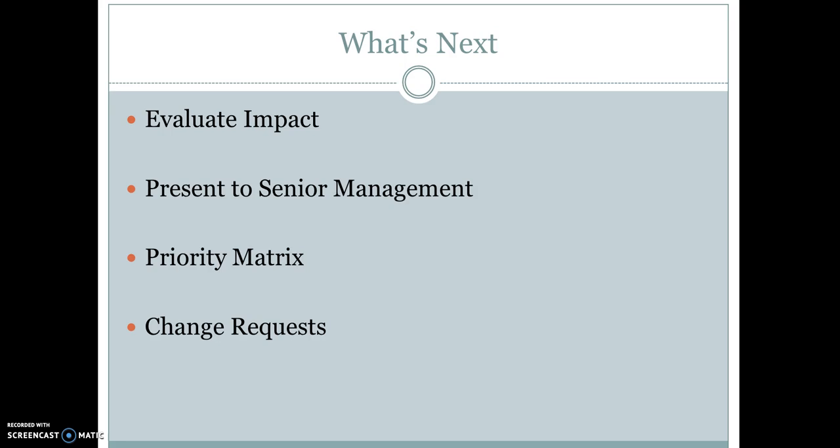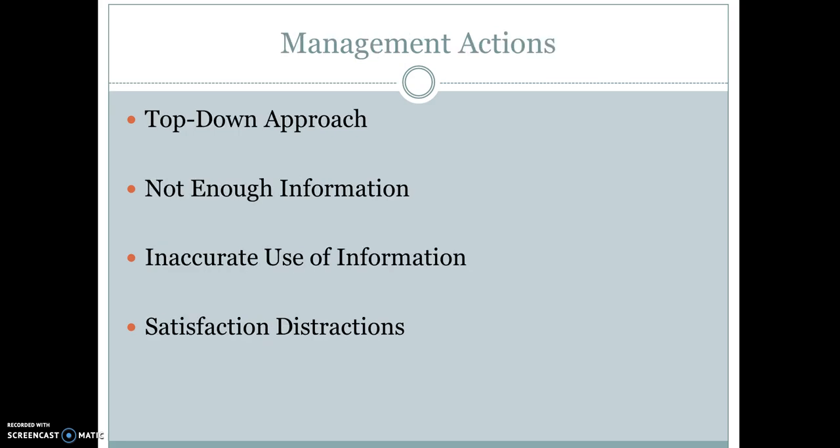On the other hand, the priority matrix could reveal factors the project team is not ready to undertake with their budget and schedule. Lastly, Lauren may be required to issue change requests if the priority matrix and impact review reveal significant project deviations. At this point, the variance between the cost and the time suggests that significant changes will be required. The change request will more than likely lead to changes in scope, cost, and schedule. Procurement should also be an area for discussion since the organization has not shown confidence in taking on this project.